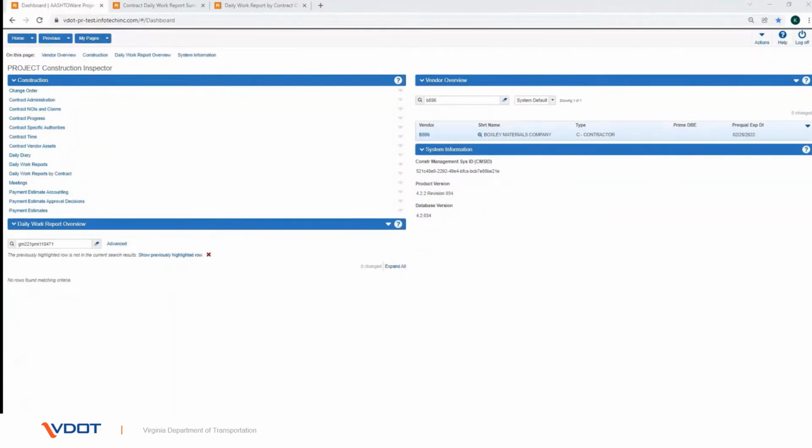In this video, we will walk you through the process of creating a daily work report and submitting a daily work report for approval. Daily work reports, DWRs, are created to document the work that is performed daily on a contract. The information recorded in a DWR is based on actual activity and not a planned activity.